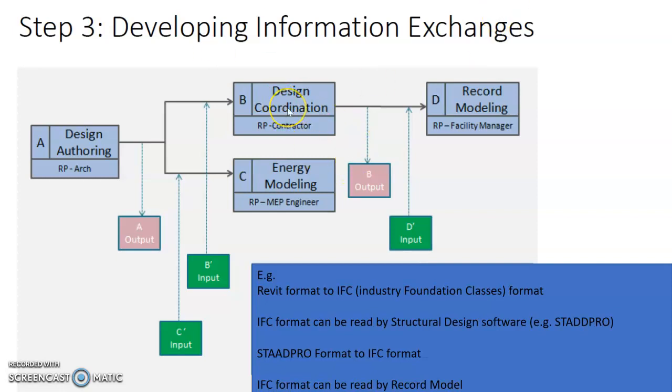Let's say in the design coordination there is a need to do a bit of structural design, and the contractor is using a software called StepPro to do the design. The file in Revit format will not be readable by StepPro. So we normally require that whatever platform the design is coming from, the output must be converted into the IFC format. IFC stands for Industry Foundation Classes.